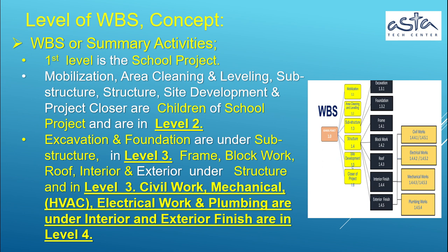Mobilization, area cleaning and leveling, substructure, structure, site development and project close are children of school project and are in level 2. Excavation and foundation are under substructure, in level 3. Frame, block work, roof, interior and exterior are under structure and in level 3. Civil work, mechanical, HVAC, electrical work and plumbing are under interior and exterior finish, in level 4.